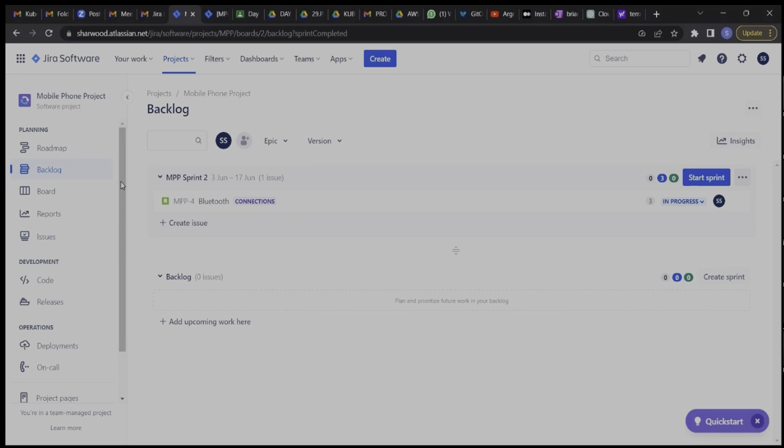The sprint demo is if we are able to come out with a working increment. If we are able to come out with an increment, we are demonstrating it to the stakeholders to get feedback, for them to tell us, okay, this is what was required, or you did it well, or if there are any adjustments, they'll tell us there. So it's an opportunity for them to inspect and adapt. We are taking the feedback. If they tell us that what we built for this sprint, they were expecting this to be there and did not see it, then as a team we take the feedback to go and adjust. And that's a sprint demo.